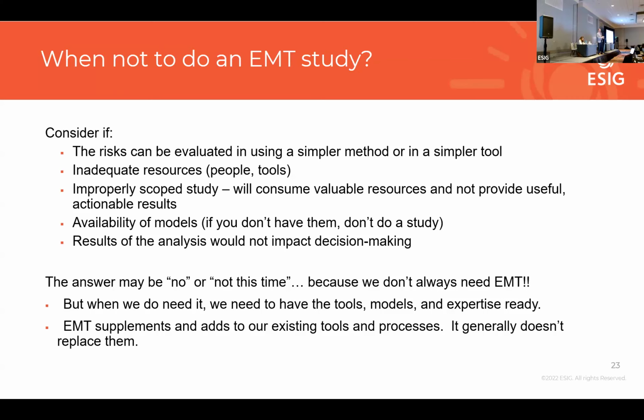And so for the folks that may be looking at this and saying, okay, I'm not checking all of these boxes that Matt's talking about, our processes and our tools are right for what we have right now. But that's not enough. Because of the time it takes to spin up and develop this core competency in EMT, you have to be looking ahead. You cannot turn on an EMT team or a tool set or a study in a day, a week, a month, really even a year. It's a multi-year process to develop that capability, even when it goes well.